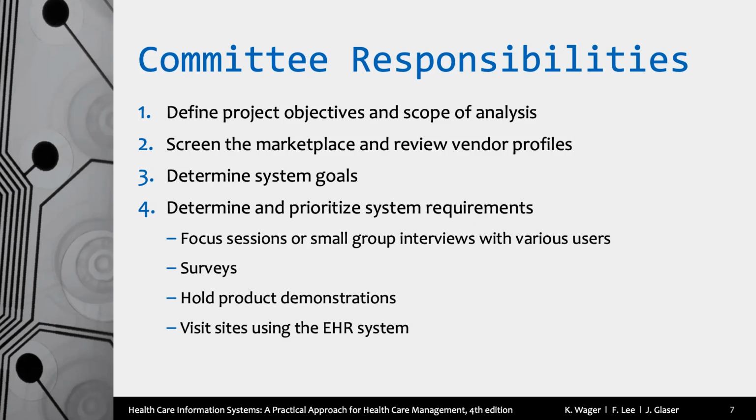Okay. So we need to do things like conduct surveys, focus groups, get to know our user population, figure out where the pain points are. We need to have the vendors demo the products. The other thing that is very popular in this space is what we call reference site visits. So that's the last bullet point here, where you would ask that vendor, hey, do you have anyone that can be a reference site for you? Meaning you want to go to that, in this case, that hospital, and you want to see that system alive and in production and see what it looks like and see, is this really what they're promising you? Is that what they deliver?